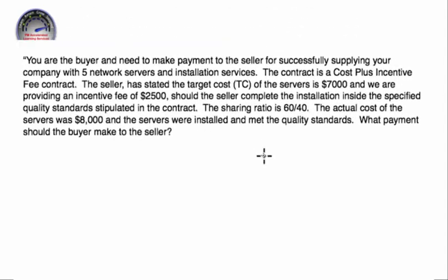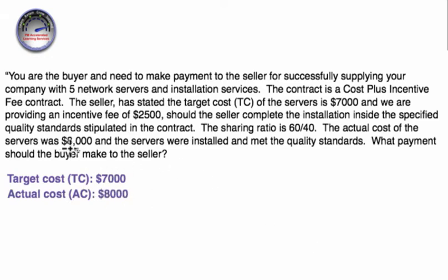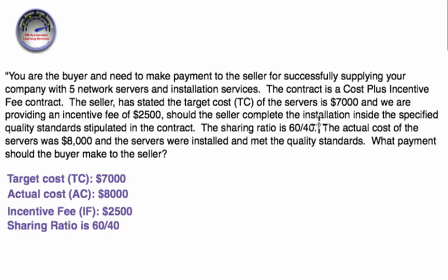Let's dive into the question. The first task is to pull out the information that is in the question. We have a target cost of $7,000, an actual cost of $8,000, and an incentive fee of $2,500. We also have a sharing ratio of 60-40 — that is 60% for the buyer and 40% for the seller. That is the standard sharing ratio. If you do see a cost plus incentive fee question on the exam, it will be a 60-40: 60% for the buyer, 40% for the seller.